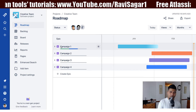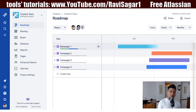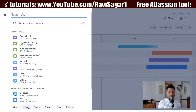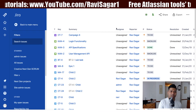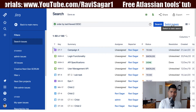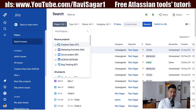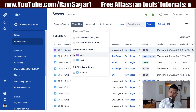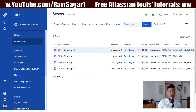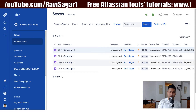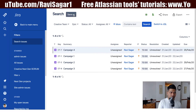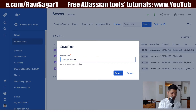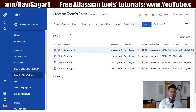Let's see if we can do something with these epics. We can always create our dashboard with our own filter, since I just want to focus on epics. If I go to my Issue Navigator in Jira, I can type in my JQL. I'll first filter on the Creative Team and then filter on epic. I can immediately see four epics filtered for me, and I'll save this filter as 'Creative Teams Epics.'